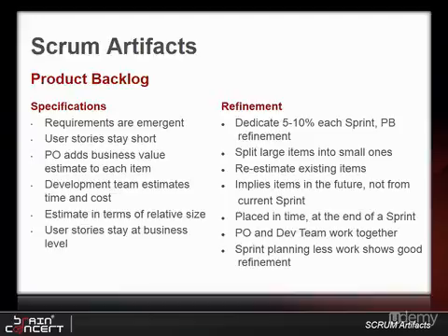Sixth, if the product owner has a technical background, he might add stories such as "add indexes to events table." Why does he want this? The real underlying goal is probably something like "speed up the search event form in the back office." It may turn out that indexes weren't the bottleneck causing the form to be slow. It may be something completely different.